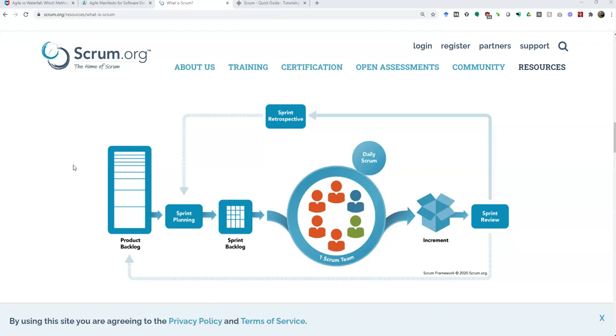It's the whole point. So again, let's talk about this. This is the sprint. You've got the product backlog. That's for the whole program, for the whole software that you're developing. Every month you'll plan the next sprint. You decide what items from the product backlog should be on it. The team will figure out who does what.